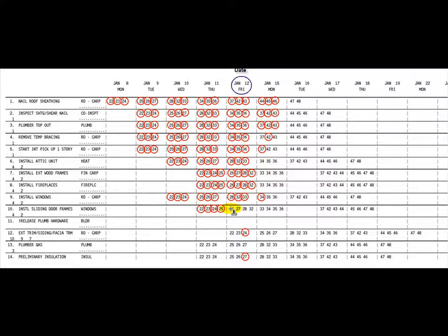This form is an example of progress being entered for this time period. The circles represent which units have been completed for this particular activity. It shows how easily anyone can mark the master schedule for progress. Completed means that the next scheduled operations can now begin. Reports from subcontractors can assist in recording current progress. You will notice that the plumber did not complete his scope of work, and we will show you the significance of this later in this video.